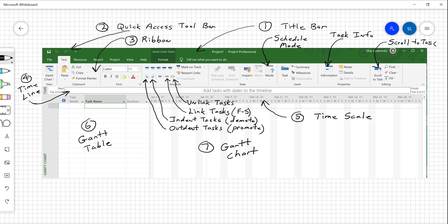Notice there are unlink and link task buttons in the scheduling group under the task menu. The link is on the left and the unlink is on the right. There are many task relationships — finish to start, finish to finish, start to start, and start to finish — but the most common is finish to start, used 85–90% of the time. When you click the link task button, it links tasks finish to start. You can always modify relationships or unlink tasks as needed.